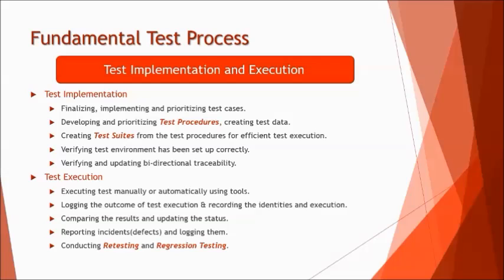For example, before you get into the login part, you must be conducting the registrations. So you can also define something like an execution condition, where you state that if the previous test passes, you should move to the next one. For example, if the registration scenario passes, then only you can execute the test cases for the login part. So you can also define the test execution dependencies, the execution flow, and the entire modules in the right sequence, called the test procedures.